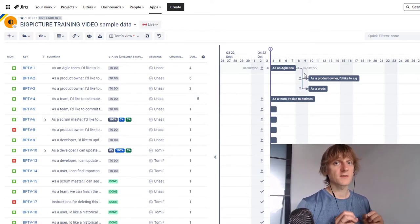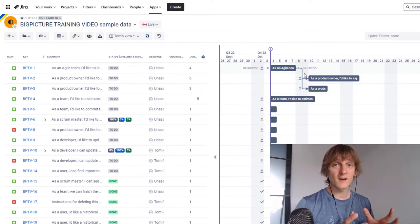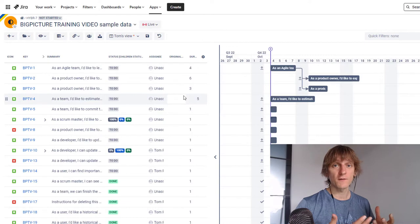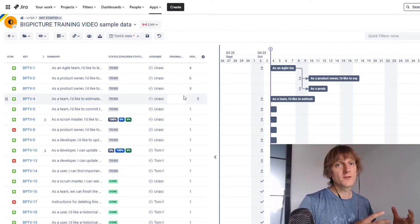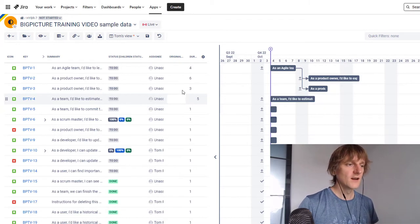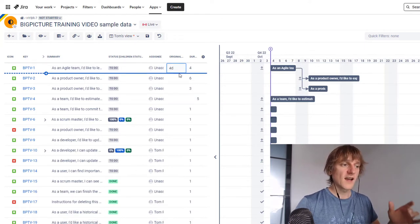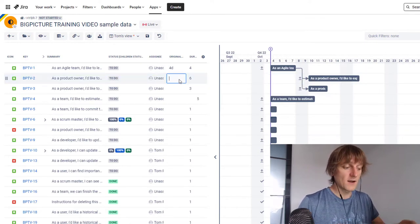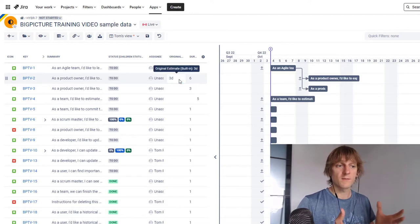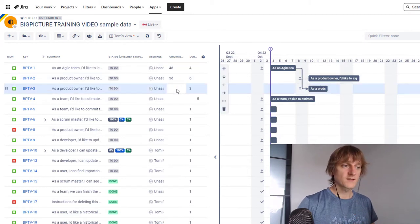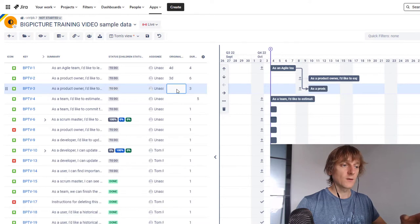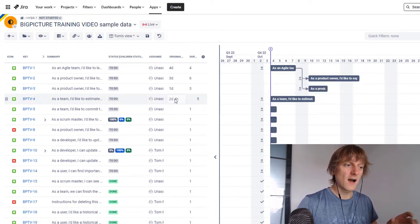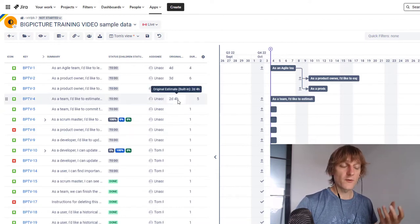Task duration is not the same as the amount of work needed to complete the task — that's the task estimate. That's why I have the Original Estimate field here, which is a standard Jira field. Big Picture reuses Jira features as much as possible, which is fantastic. So a task might have a duration of four working days and an original estimate of four days, but another task has six days of duration while the estimate is just three days — meaning someone might work only half the time on that task. We can also set estimates like one day, or two days and four hours. Now we have our estimates added to the tasks.